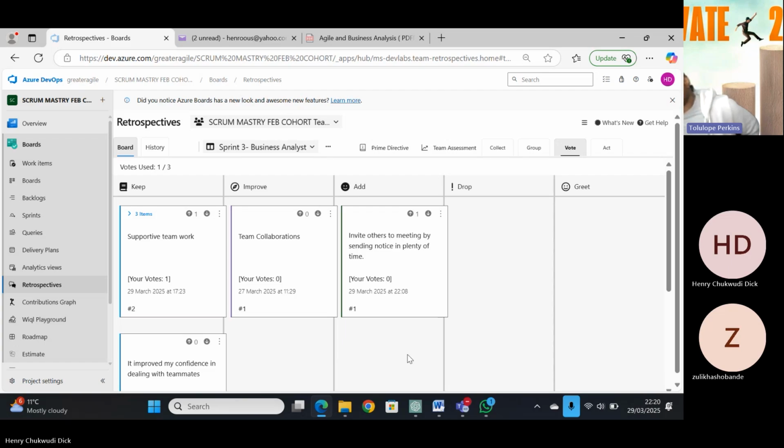Because I assigned them to myself. Maybe that's why you left it. So next time I will not assign it to myself again. I assigned it to myself, you just left them out. I thought you would have created. You even assigned 3, not even 2. I assigned 3. The third one too, all of you left it out. So I quickly went to create one task there and put it to done. But I left the retro for you because it's supposed to be the team. We're supposed to discuss it and then create tasks to accomplish them.